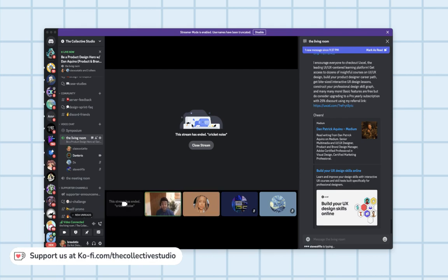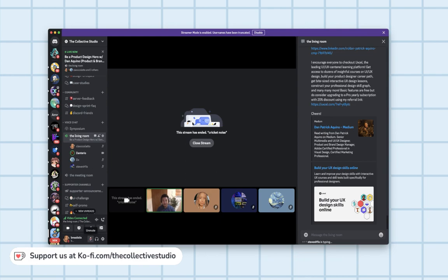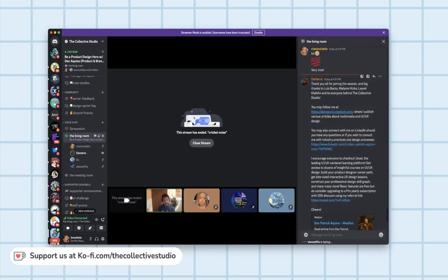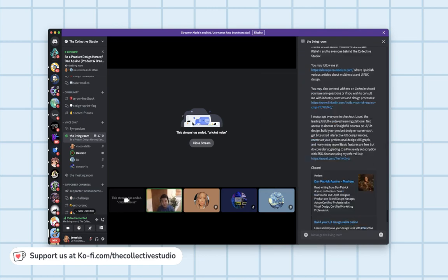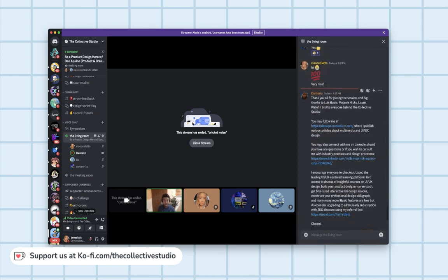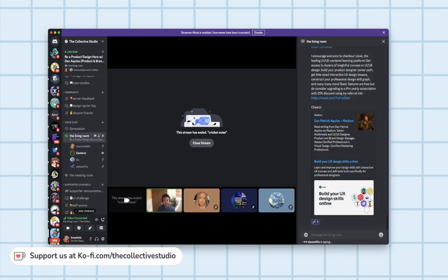Oh yeah, there will be a lot of standstills actually, because sometimes there are a lot of roadblocks. For example, you cannot really proceed without the approval of the main stakeholder, or the main approving body. So in our case, it's the CIO, or the Chief Innovation Officer, right? His job is to approve every single part or every single portion of the project before we can move on to the next.